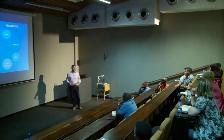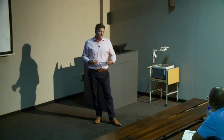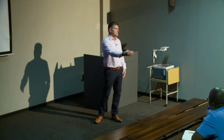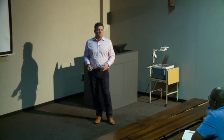Because you might think, let's say you want to launch a new chain. You work it out and you say, okay, each store will cost you X, systems will cost you this. So you do these rough estimates, and I've seen it: a year down the line, that budget is double. And that IRR doesn't look so good, but you are so fully committed, you can't turn around. And I don't think that's unique to retailers. So yes, that's where most of the time goes, into the discounted cash flows, but mostly into estimating the cost of this project.